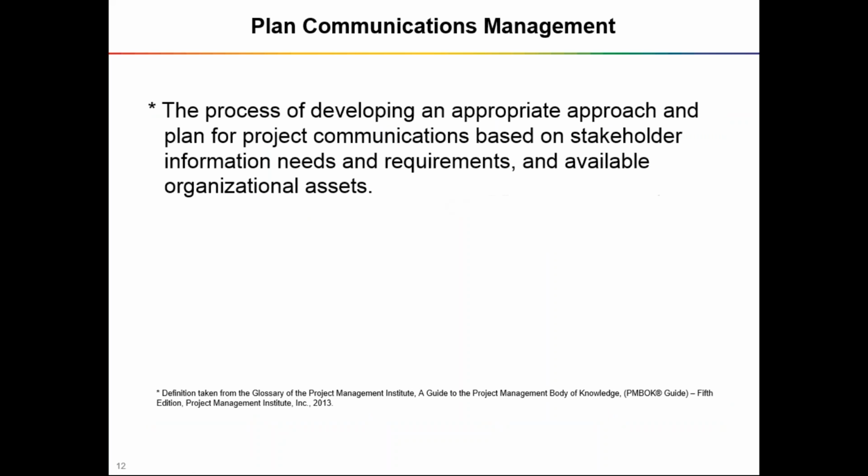First of all, plan communication management. Just before we start, anything from the PMBOK or PMP perspective, we have to be very clear on. What is plan communication management? In a knowledge area, you will see the plan, do, check, act kind of flow. Here also, we first gather the information, which is the initiation; it is not there for the communication management knowledge area. Then we do a plan with that information. Then we actually implement that plan during execution, which is the manage communication process. After that, we check whatever we have implemented, what the scope of improvement is, and we implement that in the monitoring and control process, which is the control communication process from the communication management knowledge area. Let us go into the detail.